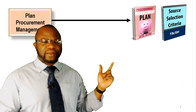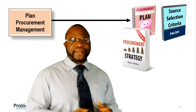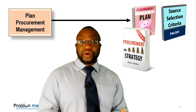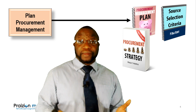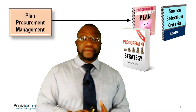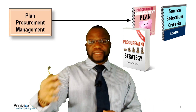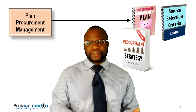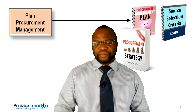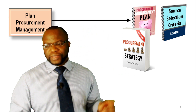But that's not the only thing you get from the process. You get Source Selection Criteria — criteria used for selection of sellers and for scoring proposals. You get the Procurement Strategy, which goes into further detail about not just the contract types but the vehicles you will use: will it be a Build-Operate-Transfer, a Design-Build, a Design-Bid-Build (DBB)? Or in the case of non-construction administrative projects, are we allowed to have a vendor in between us and someone else, or is it just us and the customer? It gets very detailed. All those contract types are not in the PMBOK guide, but I'd advise you to be familiar with arrangements like BOOT and DBB, just in case.